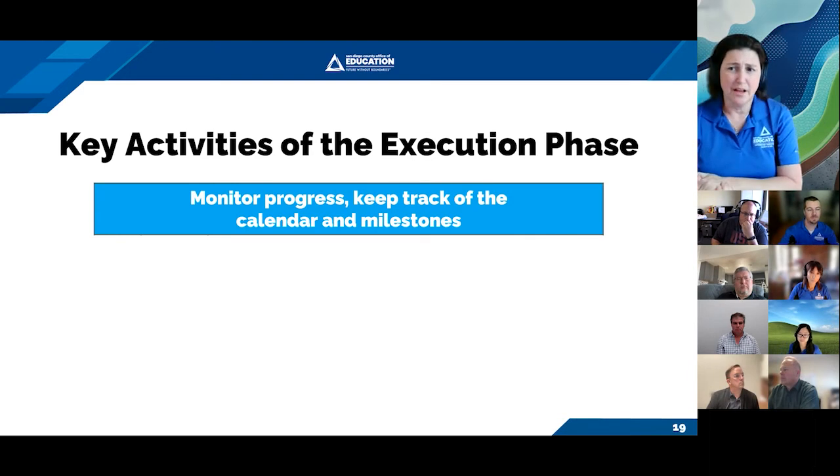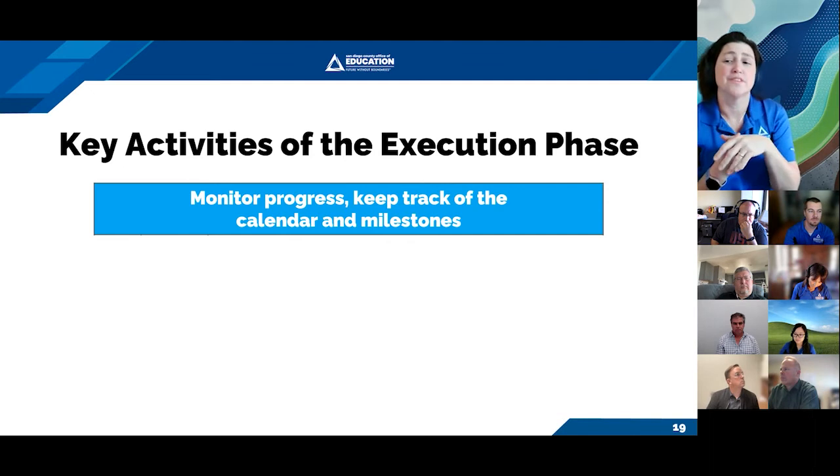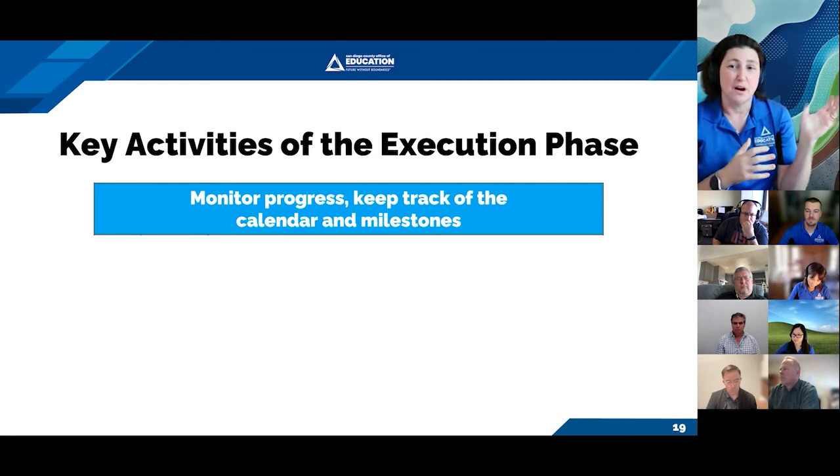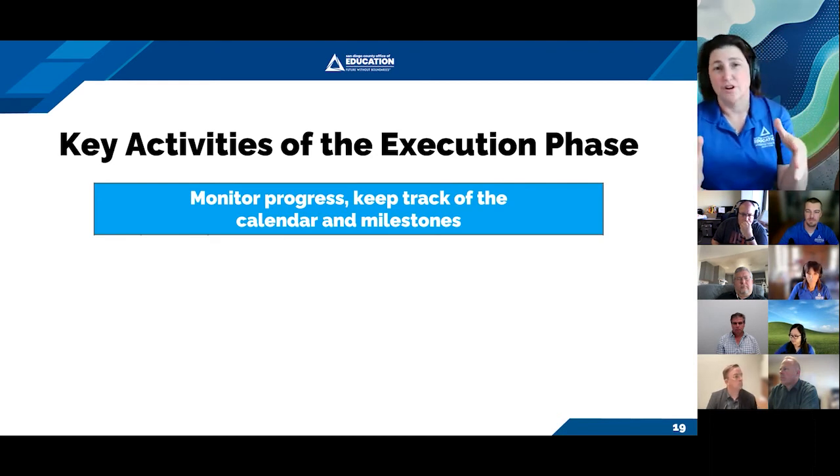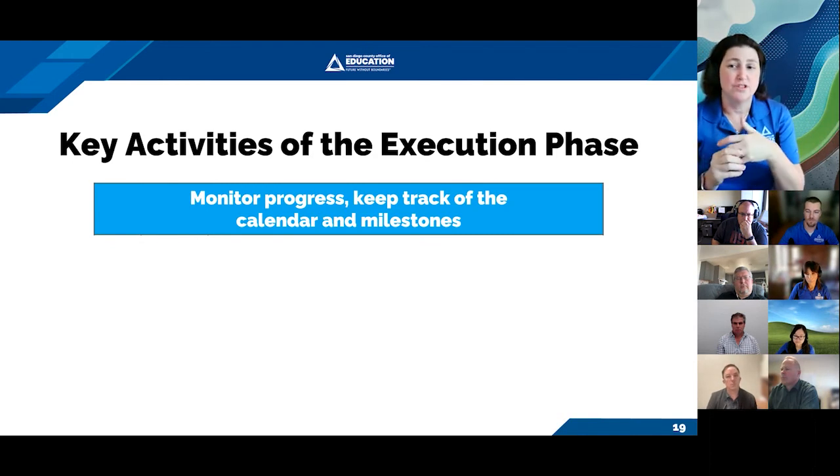So like we've said before, the project plan is really your source of truth to find those due dates, who's responsible, provide any updates. Again, we don't go back and edit our project charter. All of our changes are in our project plan. So by monitoring it, we're watching the work and those updates as they occur.